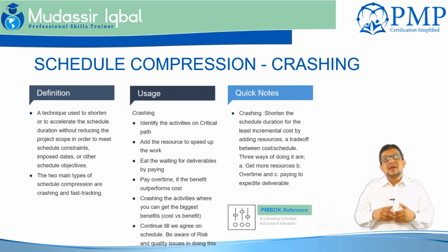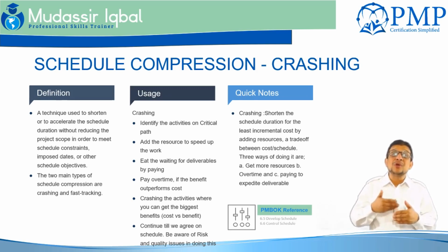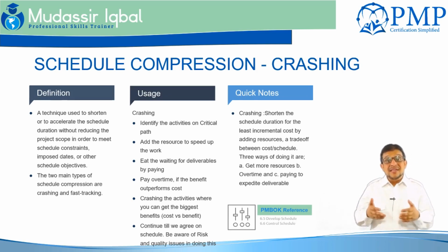So you may be looking at the cost also. You need to make sure about the resources that you will be putting on the activity: is it increasing your cost? So yes, from 5 to 3 days, but the resources that you have put in have additional cost. This is another challenge that you will be looking at. So it is not that you just see an activity, put additional resources over it, and get the best result out of it.